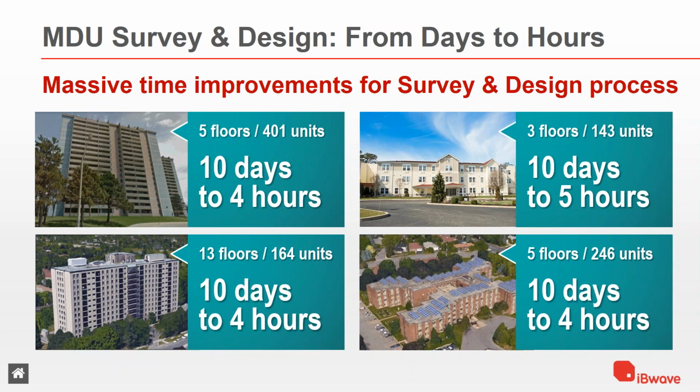So in many cases, you think you may have the ideal solution, you met all the challenges and all the roadblocks, but then when you come and present it to property management, they may not be very pleased with the aesthetics of that solution. So that takes you back to the drawing board. So the goal of our solution is really to not only increase collaboration between the processes, but increase communication between all the parties involved, and also have the approving members really involved in the initial stages of this process.